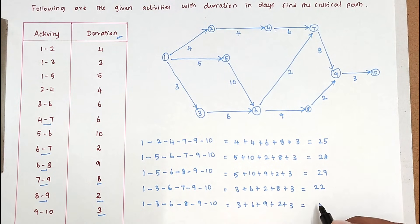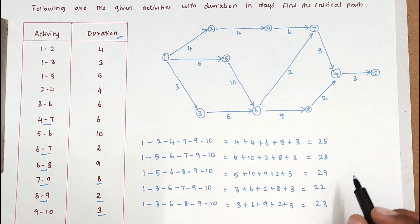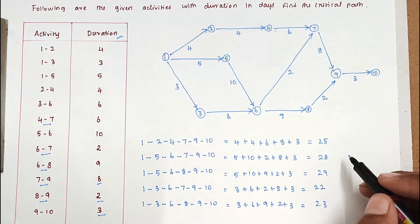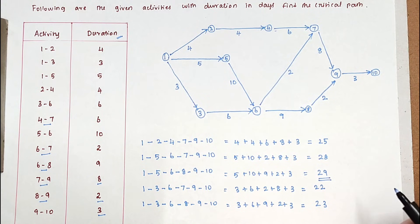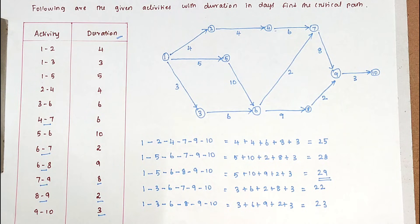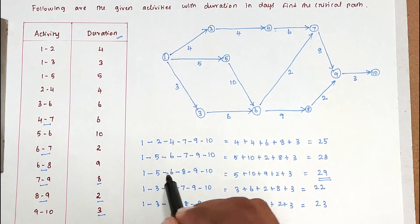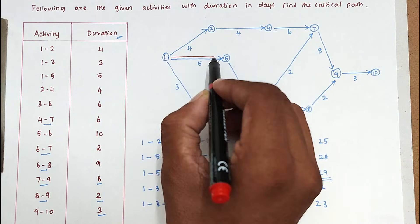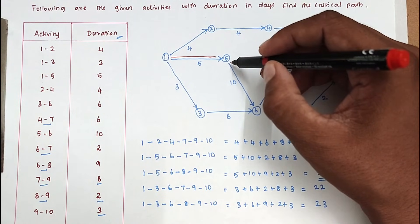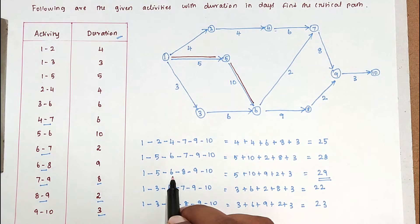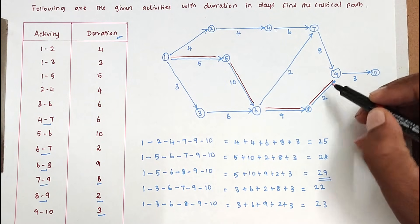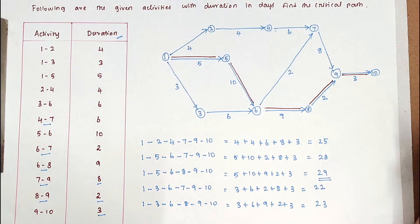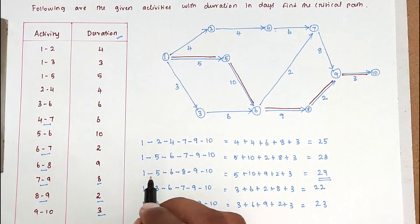As stated earlier, the maximum duration path is the critical path. The maximum value is 29, so that is the critical duration. The critical path is 1-5-6-8-9-10. We mark it with a double line on the network diagram: 1→5, then 5→6, then 6→8, then 8→9, then 9→10.